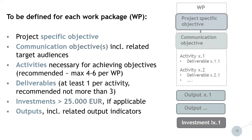At the level of each work package, it is necessary to define a project specific objective, the related communication objectives including target audiences, and the activities necessary for achieving these objectives. We recommend a maximum of four to six activities per work package, though more is possible if justified by complexity. For deliverables, there should be at least one per activity, and we recommend no more than three to avoid fragmentation — though more is acceptable for long-duration or complex activities.